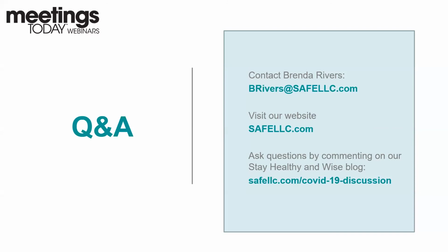For the other types of events where the organization is paying for everything, the organization pays for the attendees to go to the event, they pay for their air, they pay for every expense, I have not really seen a lot of organizations take that out. And I think one of my recommendations for companies after we get out of this is to take a look at what it means to self-insure for things that definitely won't be covered, or if they are covered, the cost is going to be so high to pay it every year, you may as well self-insure.